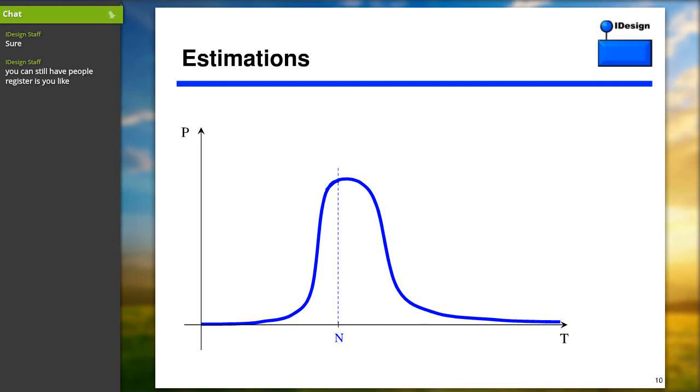What about 11 months, 3 weeks, and a day? Well, we feel very good about it. What about 9.5 months? Well, I don't know, 9 months for a 12-month project? I mean, where are you going to squeeze the other 3 months? I don't know. So what we see is that to the left of the nominal date, there is some kind of a tipping point, which is fairly close to the nominal estimation, where the probability for success drastically increases. Short of that, you're dead.